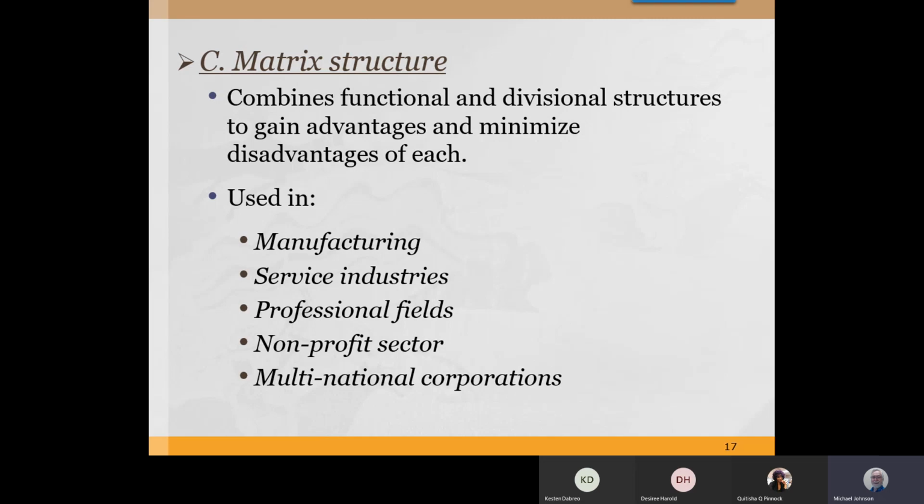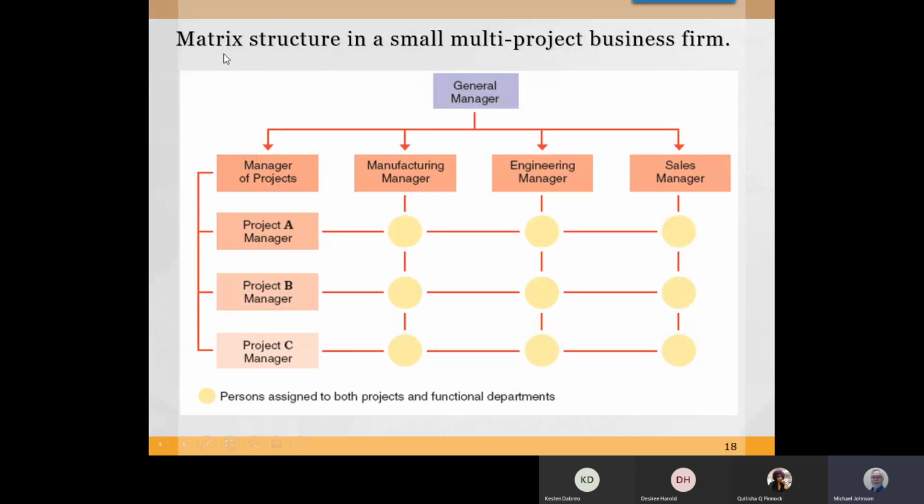So you could actually have a situation, and I'm just going to go to the extreme here, where you can actually draw people from one department and put them into another department when you're in need of something. This is a matrix structure. Normally, it's not a regular manager, okay? This is usually a project manager who is working on a single project, and therefore they have the power to draw from all the different departments. It often happens. It's not a well-liked approach in some of the older companies because, remember, your manager is paying your salary, but now it's another manager who is controlling your efforts.